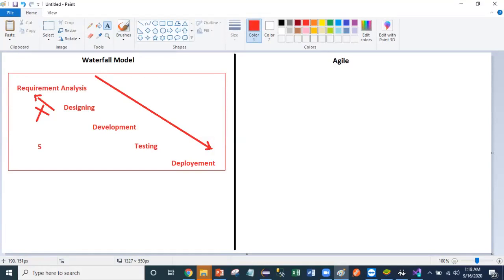So this is something that causes the problem, and this is where the waterfall model comes into the picture. They go step by step. Once they finish the designing, they show the customer this is what we have designed, now give us 20 more percent of payment. Once this is developed, they show the customer this is what we have developed, now give us 20 more percent in the payment. This is how they set up the milestones for the payment as well, with their work, with the time, with the payment milestone, right? And this is how the waterfall model works. You got my point?